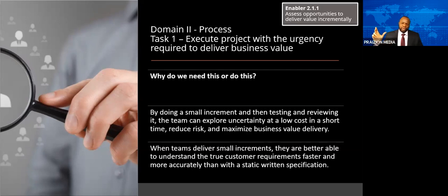Case in point, I'm working with a client and I give them a final product, and they're kicking back so many change requests that it became apparent we needed to get a mock-up demo in front of them quicker. Not the full thing, but if we just had that minimum viable product that we could send to them to get enough feedback to guide us on the right trajectory, it would have been a good thing. It would have been time well spent.